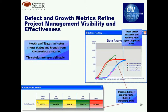We all know the impacts of poor estimates. Inaccurate project estimates can reduce project success in numerous ways: poor implementations because we don't have the time, effort, or staff to do what we want; critical processes that don't scale — a project planned for a few people that tries to grow to many can fail just because of that; emergency staffing — hurrying to throw in extra people to get it done; and cost overruns caused by underestimating the project's needs in the first place. On top of that, there's the frustration of developers and management, and more project failures related to poor estimation.